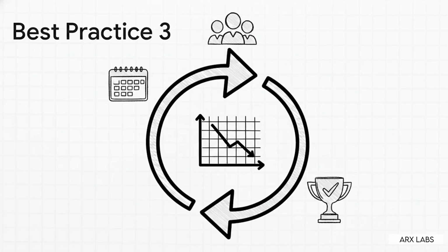And finally, you have to embrace the rhythm of the iteration. It's not just about the planning meeting at the beginning. The real secret sauce is the daily discipline. Every single day, people need to update the status of their work. Why? Because that's what feeds the data to your burn down charts and makes them accurate. Without that daily update, all those cool progress charts are basically useless.